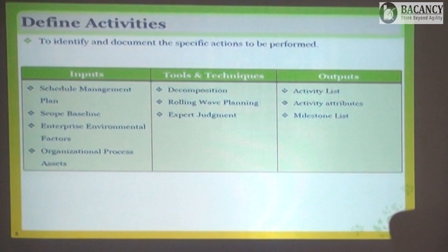In that assumption log, you document that this is based on the assumption that the right type and quality of tomatoes will be available in the market. If not, you need to have this calculated and considered in your alternative generation, and also in your make versus buy analysis, which we will do in procurement. Who is stopping you from buying this soup from outside also? Isn't it? But that decision has to be based on certain facts.